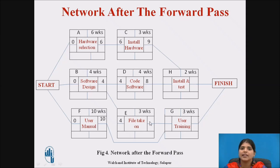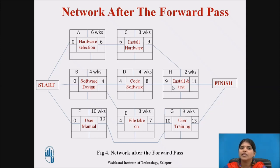For E, precedent B finishes at 4; earliest finish = 4 + 3 = 7. For G, precedents are E (finishes at 7) and F (finishes at 10). We take the larger value — 10 — as the earliest start for G; earliest finish = 10 + 2 = 12. For H, precedents are C (finishes at 9) and D (finishes at 8); take the larger value 9; earliest finish = 9 + 4 = 13. After G and H complete, the project finishes. Since 13 is the larger number, the project takes 13 weeks. This is how we calculate the forward pass.